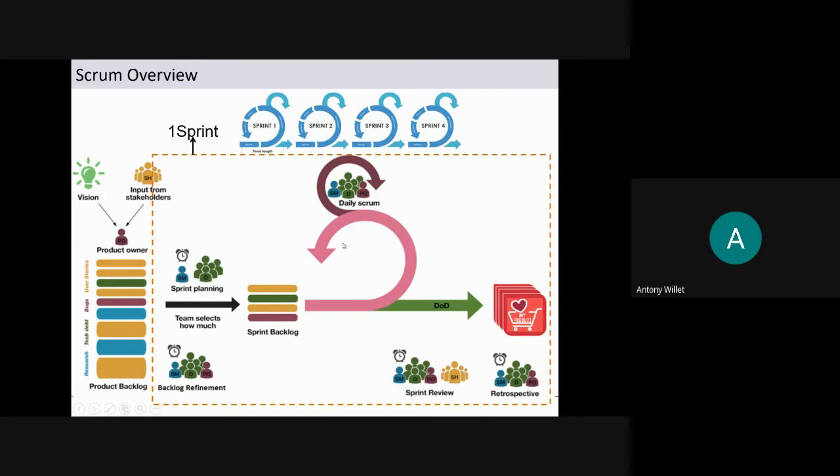In very rare cases people get doubts about requirements, but some dependencies can be unearthed during the sprint execution. Or they need support from an architect or database administrator. So things like that, the Scrum Master will resolve the impediments. Okay. So the daily Scrum meeting happens every day during the sprint, 10 days or 12 days, every day.